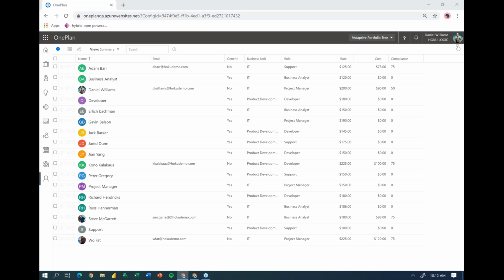You could do that previously, but what you can now do is use today as a function and compare today to the due date of the task, and then do total roll-ups. Like, I just want to show tasks that are overdue, where the due date is less than today, meaning it's overdue. So just a new function that you can use on some of those total roll-up calculations.